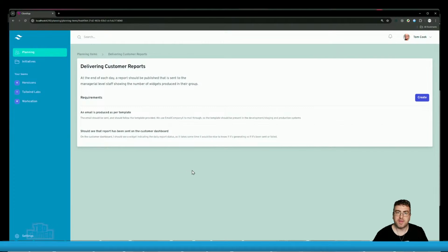When you have a meeting, this might be what you discuss. That grooming meeting might be to discuss these planning items, and you're saying, well, hold on, that actual requirement, we can't do that, so let's remove it. Or that requirement needs to change, and we need screenshots on that. Everyone can see that the pieces were put together. And when they're produced, notifications go out to tell people, by the way, this planning item produced X number of stories on X, Y, and Z team. So visibility, notifications, accountability, before it even gets to developers.